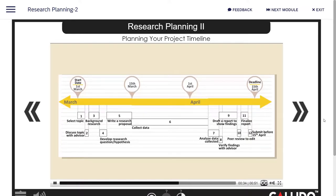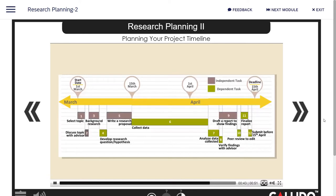Lastly, are there any tasks that are dependent on other tasks? If so, sort the independent tasks from the dependent ones. Color code them. Put the independent tasks earlier on your project timeline for efficiency.